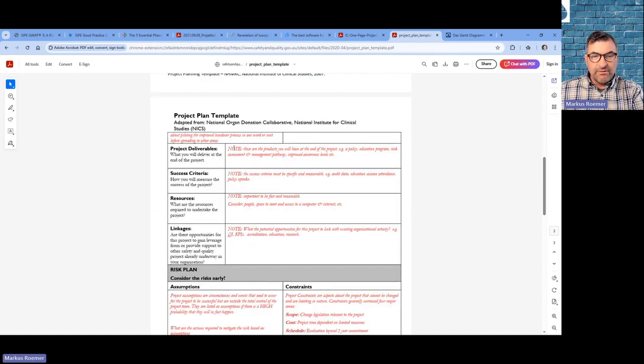So what are the project deliverables? A list. This is very short here. That normally goes 2-3 pages if I do a project plan. What are the deliverables? User requirement specification, an audit report of the suppliers, quality management plans by the suppliers, risk assessment on functional level, on testing level, on the most important one, on process level, whatever. All the deliverables that must be created. You can even combine it with milestones or quality gates, something like this.